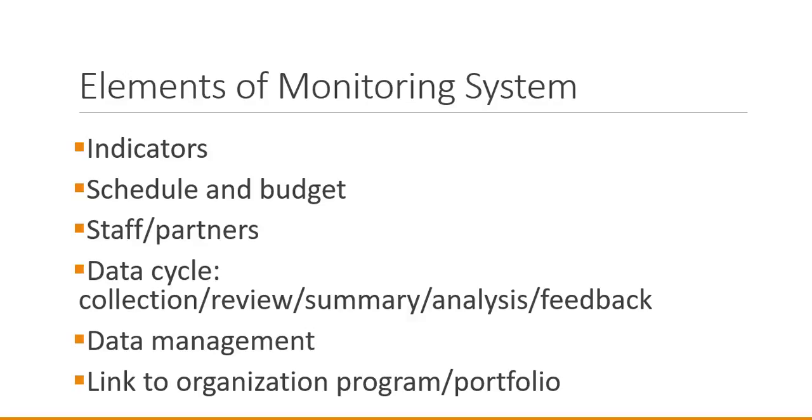The data cycle of the monitoring system includes collection of data, review, summary, and analysis of data, which then results in information, and feedback to the project manager based on that information. Things are going as planned, continue what you're doing, or make some adjustments, and the feedback should include specific recommendations for changes or adjustments. Data management is keeping the data accessible and secure, and the link to the organization refers